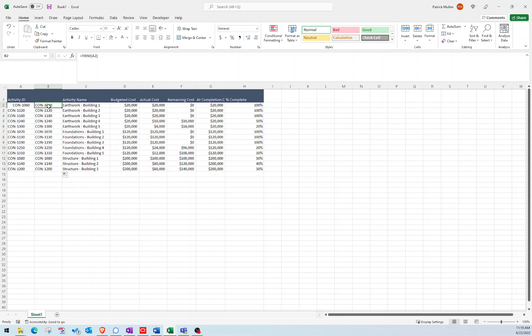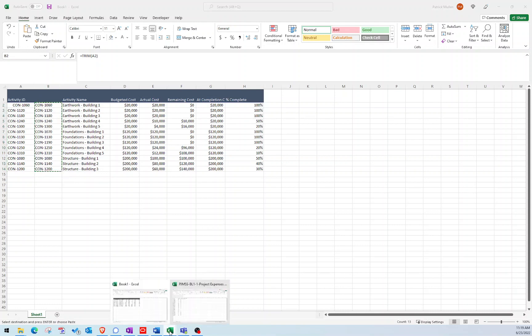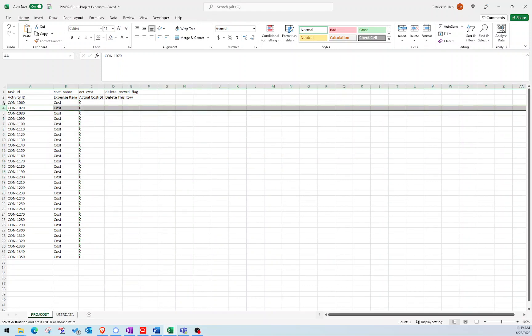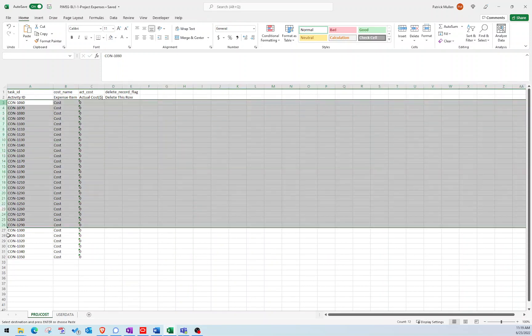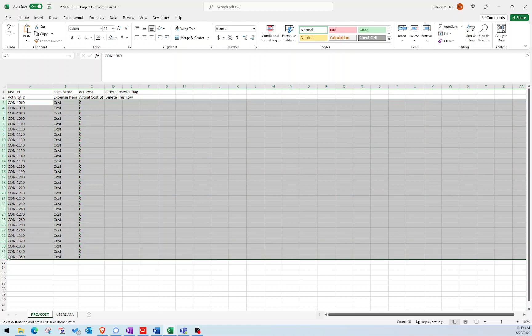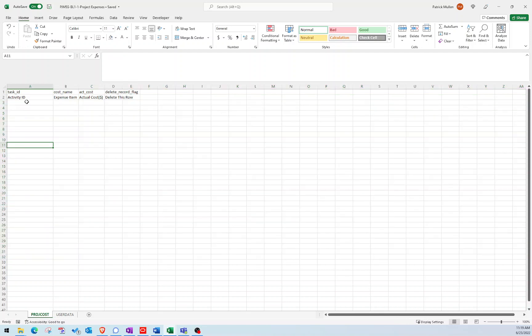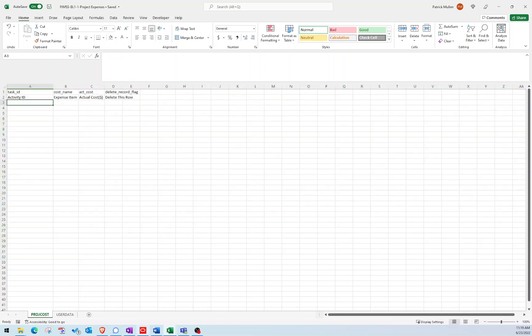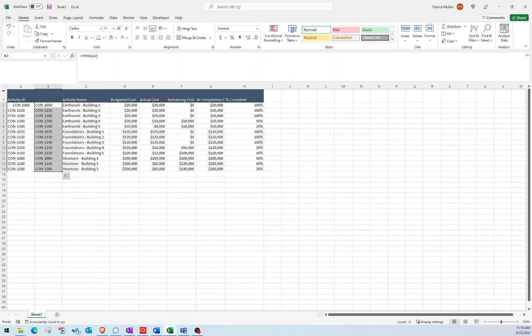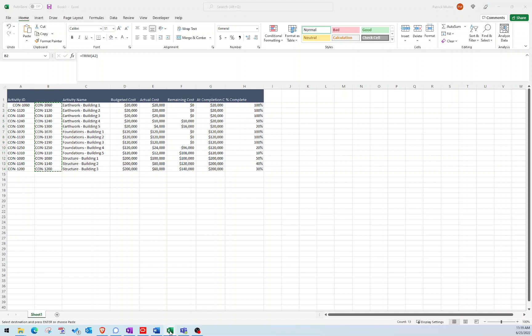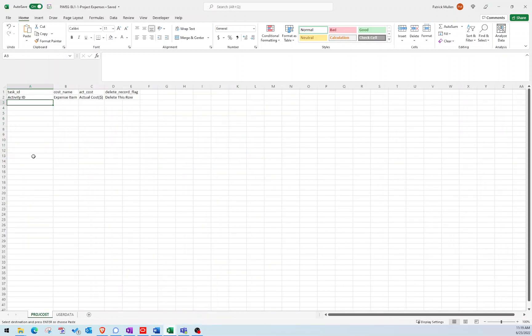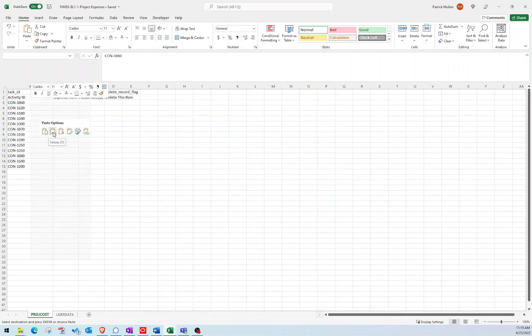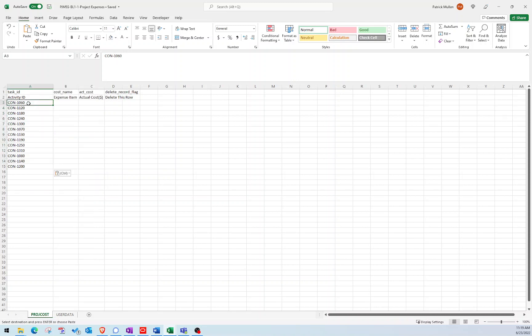And so that's what I'm going to use, that formula, that one that we just did. I'm going to copy that over into our template file. I can actually delete all of these. And I'm going to, I have to recopy that. So let's copy our activity IDs that have been cleaned up. And then I always do paste values. So just right click and say paste values, and that way we're not dealing with formulas because you can't have formulas in your import sheet or else it won't read it.